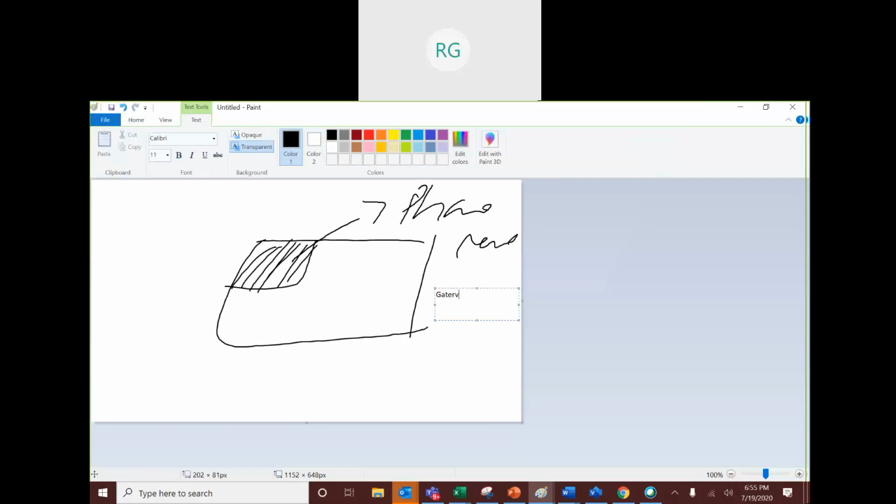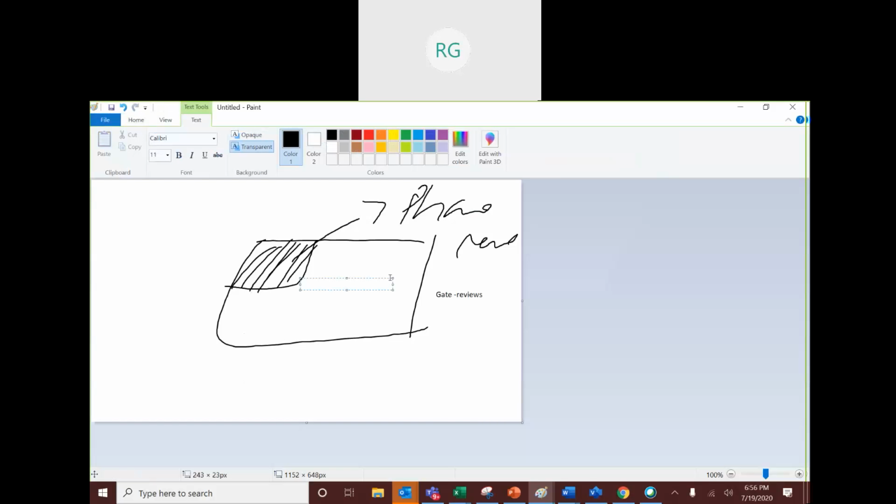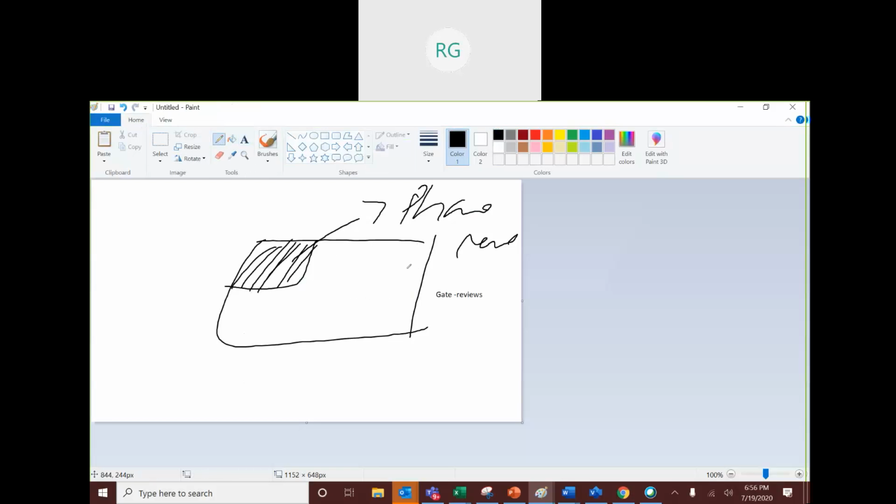When you say gate reviews, you take a little feedback from the stakeholders, saying, we wanted to build the whole website, we finished a portion of it. Can you give us feedback? Are you all good with this? Taking the feedback, you move into the next part of the project where you build another piece, and then you take feedback again. You start building this part also, then you do a phase review again and take feedback again.